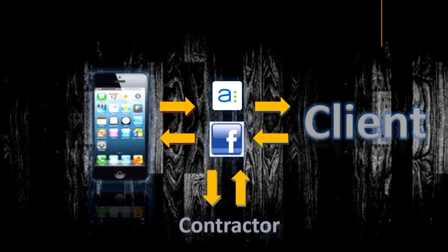All important stakeholders, including the contractors, can immediately comment on the photo report, thus setting up a deadline. Contractor or PMC finally posts the rectified comments and closes the photo. So here's the list of advantages with this process. There is no time loss in report transfer. Second, a good photographic report will be derived from the application for each day. Next, the PM team can support safety officers throughout the week whenever they take a round.